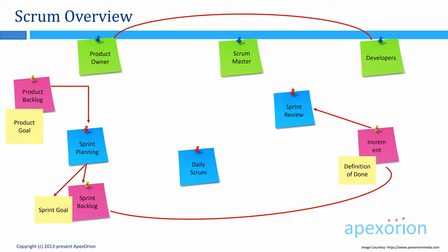Product owners, Scrum Master, and developers participate in Sprint Review, and the increment is showcased to the stakeholders. Plus, if the team needs any help from the stakeholders, they talk about it. They also talk about the market, the release, the competition, and stakeholders provide feedback and help that the Scrum team needs. The feedback is usually captured in the product backlog.